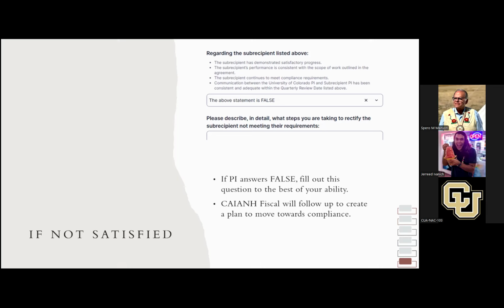That's a good question. We don't currently have a process in place. What we do is, every day we're looking at the invoices that are coming in, and every other month I go through every project and every subcontractor and look to see when the last invoice was, and I'll reach out. Most of our contracts do say that they have to invoice not more frequently than once a month, but not less than quarterly. So they're all usually closer to a month, but we'll check in with the site if they are not invoicing more frequently.